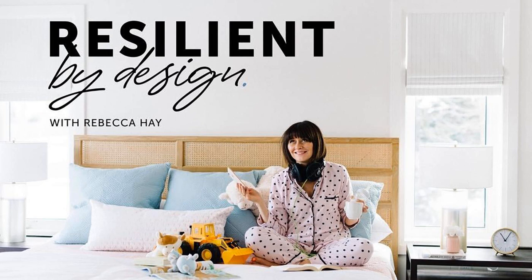This is a good one. This is something that is relatively new in the last couple of years for us. Place all of your orders a minimum of 2 weeks before you start demolition.